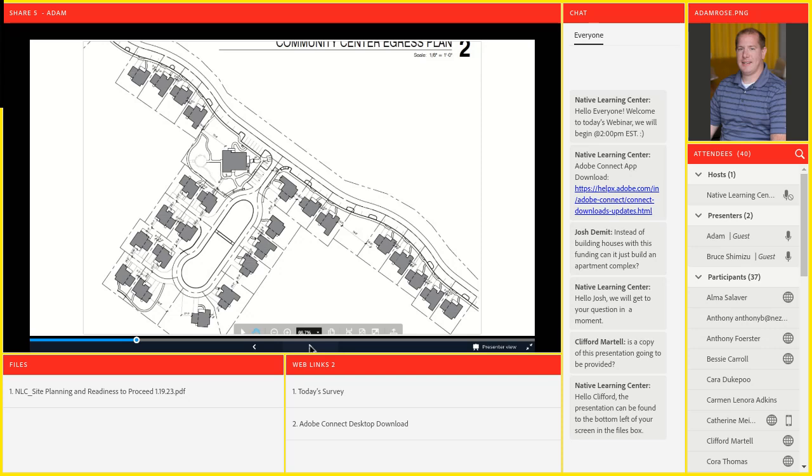Yeah, one of the desires of the tribe, because of the rural character of this site, and they knew that they didn't need a 75 unit apartment here, was to look at the rural character and have housing units that match the surroundings. So they opted for small detached homes, which per unit are more expensive because you have more siding, more roof, etc. But the character of it, as a senior development for the elders in the community, was important.